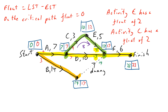Similarly, the orange loop at the bottom takes 14 to reach that node. This gets trickier because you're not just comparing it to the critical path, you're also comparing it to the green path. You can change this by a total of three — that's the difference in the boxes: 0 and 3, or 17 and 14. There's a float of three on that orange loop. You could start B three hours late and not delay the project — or if you start B at exactly the same time as A, you'll be waiting three hours for D to finish before you can start F.